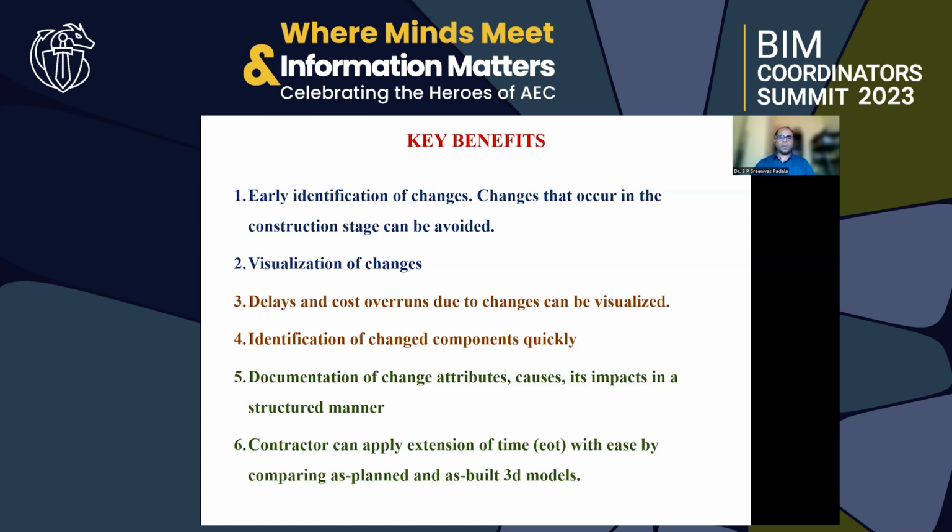So what happens is, when you are able to document all the changes as you move on in the project, you can also claim an extension of time from the client with ease, by showing an as-planned versus as-built comparison. It will also make the approval process for getting the extension of time easier and shorter.